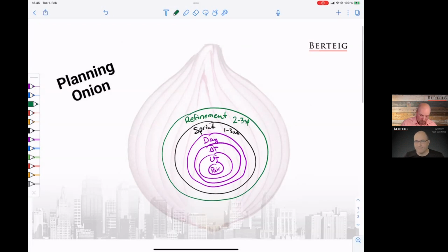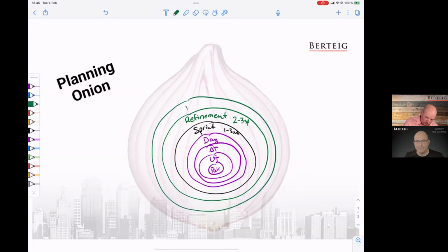The next layer outside of that is what I call release. To me, release is the next major chunk we want to show to the world. It's the next chunk we make a big fuss about. It's not a deployment. Deployment is putting something into production, and we might do that every sprint. We might do it multiple times a sprint, or whenever we want to fix something like a bug. But release is a new capability, a new feature, something that's possibly connected to marketing events, sales activity, trainings, education, all kinds of things associated with actually using the release.